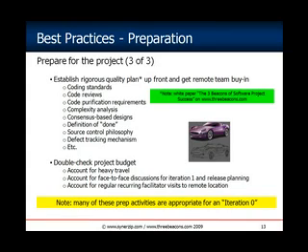Now, all of these prep activities, you could define in what we commonly call an iteration 0, which is primarily a positioning iteration to help the other iterations be more successful. And here's a verbal list of some of the things that you can accomplish in an iteration 0. You should get your Agile training done during that. You should establish a project vision.